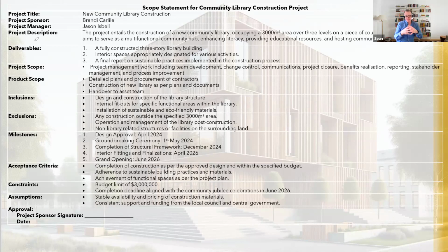But the problem was when that version of the plans was sent out to the contractor's headquarters, when they got that version, they couldn't tell, by looking at the front page, that that version was anything different from the previous version they had. And they just thought that they'd been issued a new set of plans, another set of plans, identical.